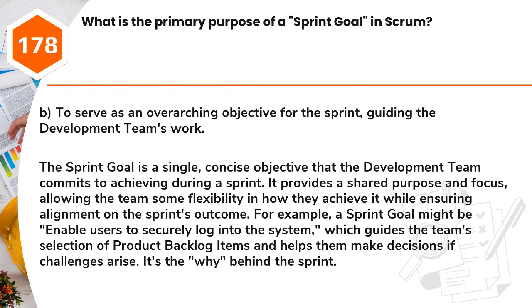on the sprint's outcome. For example, a sprint goal might be, enable users to securely log into the system, which guides the team's selection of product backlog items and helps them make decisions if challenges arise. It's the why behind the sprint.